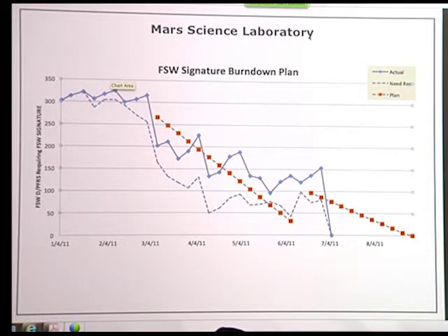We wanted to keep the developers focused on the development, and what Amalaye was involved in was getting the important, pertinent data out of the internal tool, paraphrasing it properly, and getting it into the institutional tool for the system people to digest just the fix, and not all the possible root causes that were considered in leading up to it, or all the potential fixes to repair it.